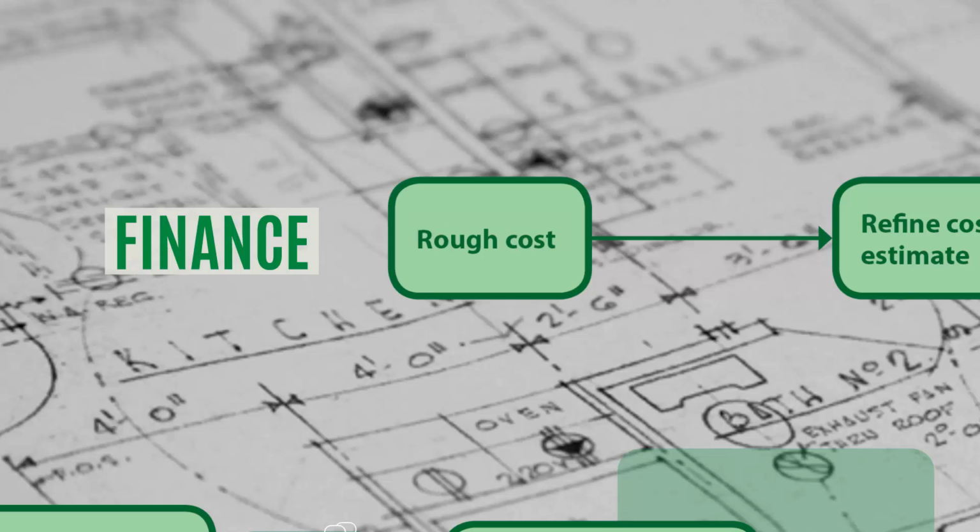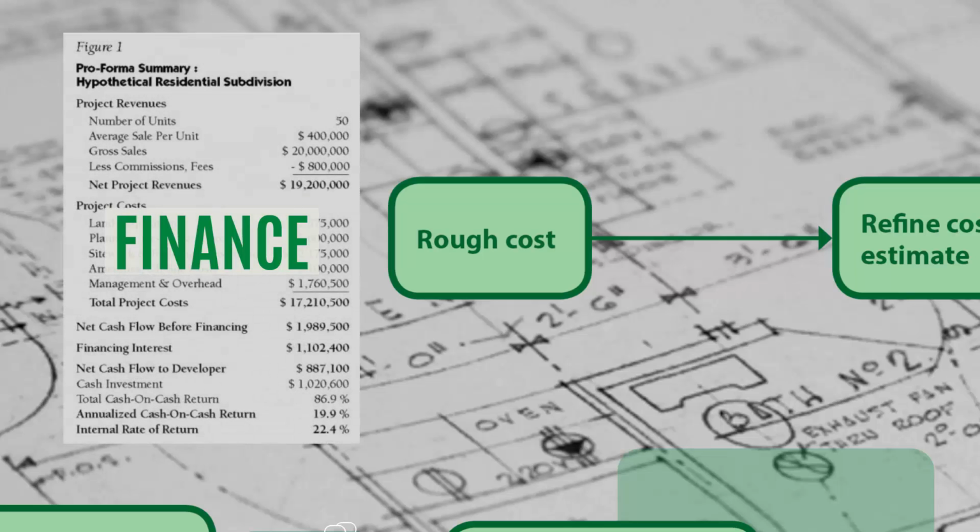If a development concept is going to move beyond the idea stage and become an actual project, it must be financially feasible. Early on, much of the focus is going to be on estimating a rough cost. As the specific site and building plans start to come into focus, experts can begin to develop back-of-the-envelope projections on cost. These are often based on very general industry standards, like a total cost per square foot for commercial construction, or they reflect initial information about items like a property's asking price or prior estimates that quantify potential environmental remediation costs.